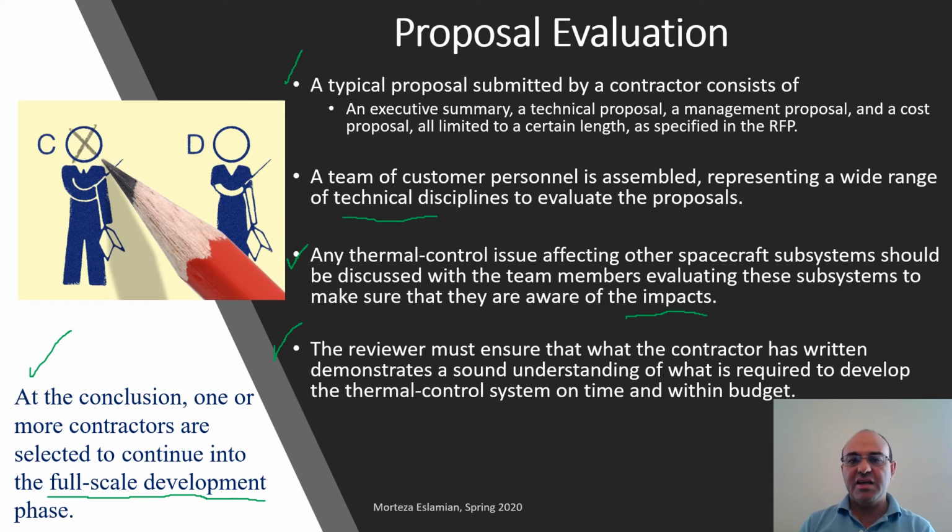Like, if the budget allows, actually more than one contractor can be chosen. Let's say in the case of the Artemis program, to go back to the moon, NASA has selected 2 or 3 private companies to deliver payload to the surface of the moon.